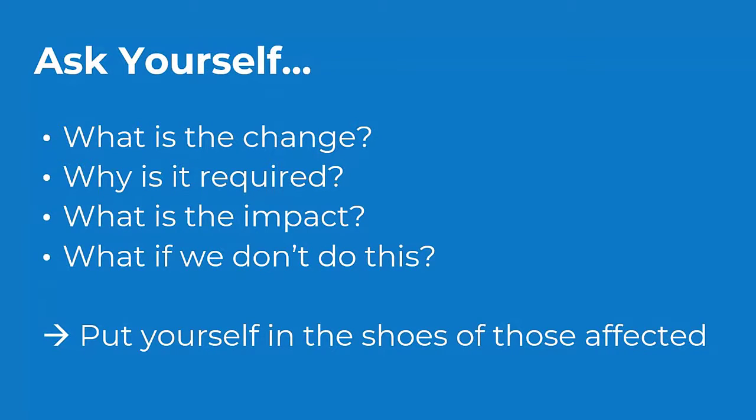Bouchard recommends that you ask yourself these questions at the pre-business case stage, and then incorporate them into the business case. First of all, what is the change? Right? What exactly are we doing? Why is this necessary? Why are we doing this change? And how will it impact those who are affected? And I think this is also important: what if we don't do anything? Right? What will be the consequences if the change does not go ahead?